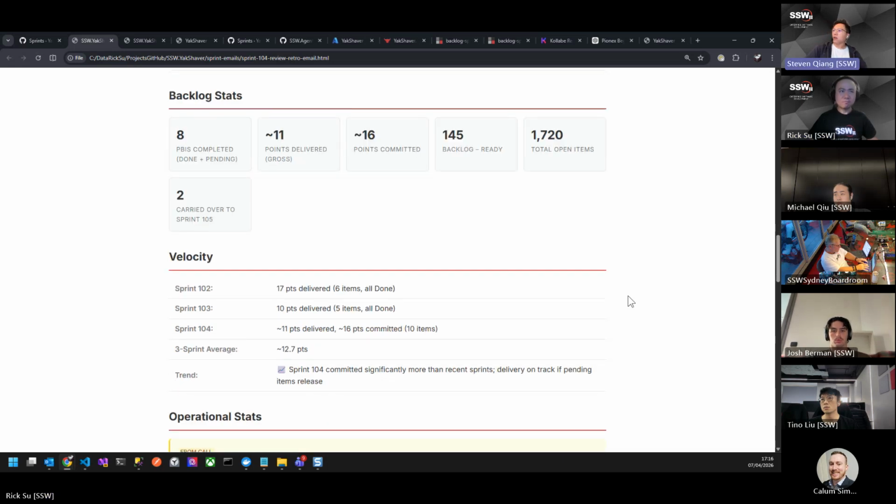Yeah, thank you, Rick. So the backlog stats. For the last sprint, we have completed 8 PBIs, including 1 pending PBI. And also, we have 11 points delivered with 16 committed on the planning. And we have 145 backlog items ready and 1,720 PBIs in the backlog across 2 repositories.